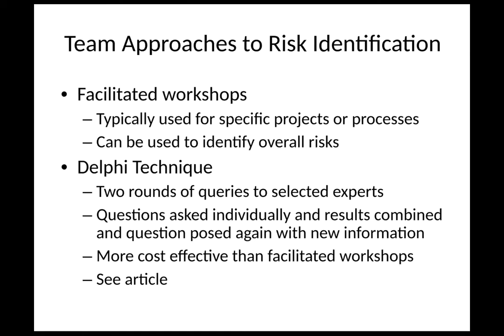And that's basically the idea of a Delphi technique. It's two rounds. You have people that are experts. You collect the data, and then you send it back out with the information. You see, does that change their opinion of what they were looking at? More cost effective than a facilitated workshop, because essentially you're doing a survey. You don't have to be in person to do this because it's individual, and you collect the information.